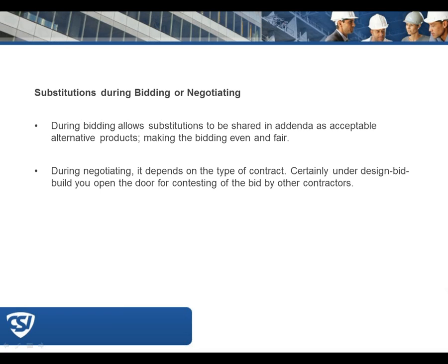For me, I think it depends heavily on the delivery method. If it's pre-bid and we are in some kind of design build or CM situation, I'm going to insist that it come through the general contractor. If it's pre-bid and it's a public design bid build project, knowing what contractors have to go through on bid day to put numbers together, I wouldn't require them to handle all of the substitution requests coming from every manufacturer or subcontractor out there.